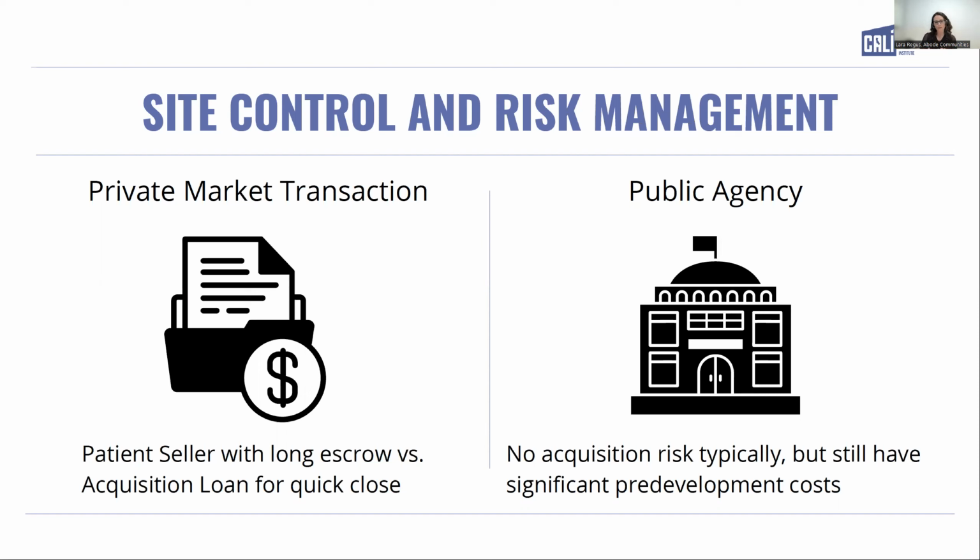So often, if we're going to purchase a property, we're looking for a seller that's patient, that is willing to work with us and go into a long escrow so that we don't automatically have to purchase that property and start spending money on acquisition interest that goes with an acquisition loan. So, kind of minimizing expense, putting a good deposit up to hold on to that site,